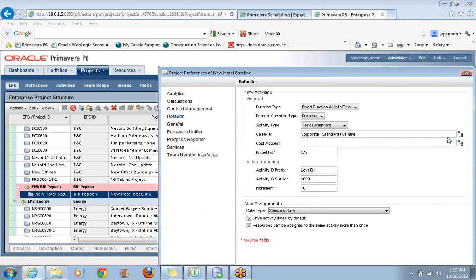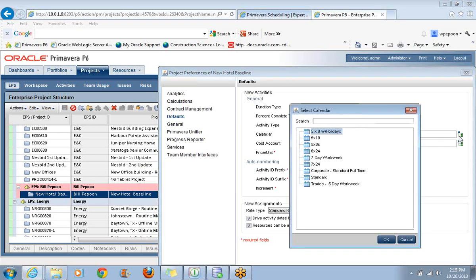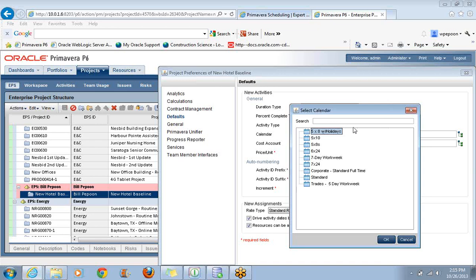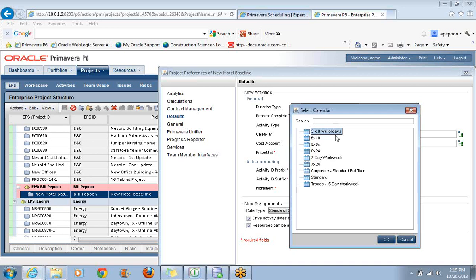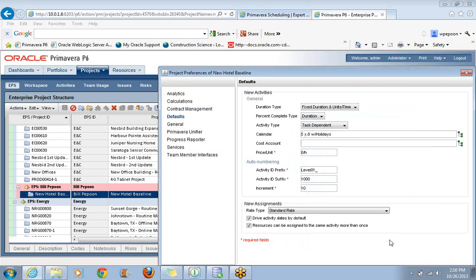Under the Defaults, rather than this corporate standard full-time, I'm going to come in here and grab my 5-8s with holidays. Now here's something I learned the hard way. In P6 Professional, we click on different tabs where you're selecting calendars. Here you can't tell them apart. If you give it a name like one of the other ones that's global, it's going to be very confusing. I sometimes have resorted to naming the calendar after the project. Thankfully I put the word holidays on there. That makes it a little bit more obvious. This was the one I actually copied. Now we'll make this the default by clicking on OK.